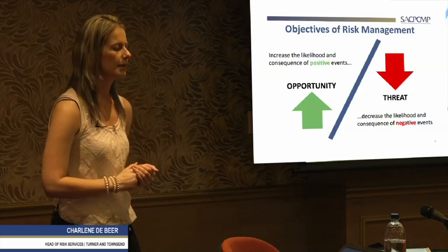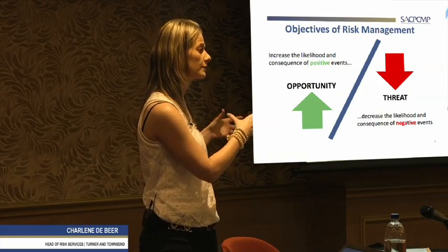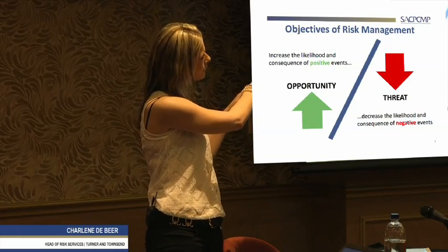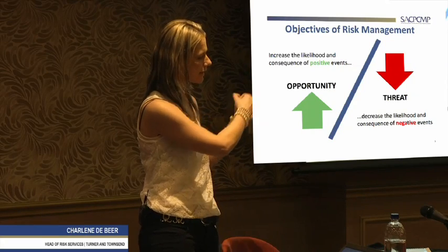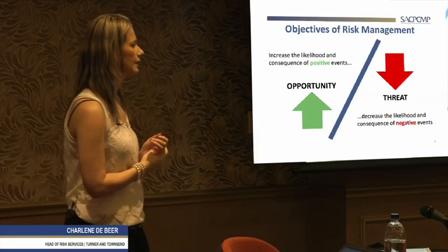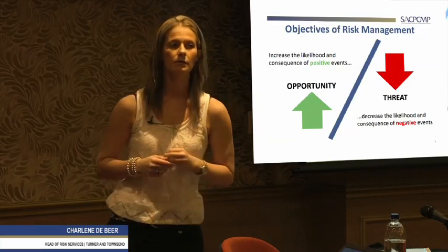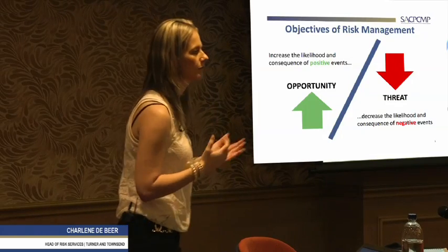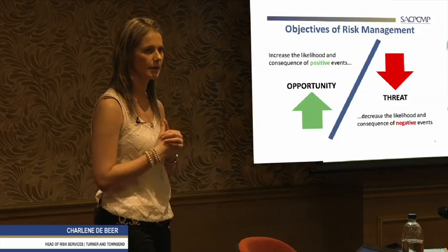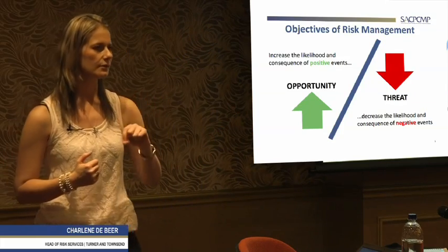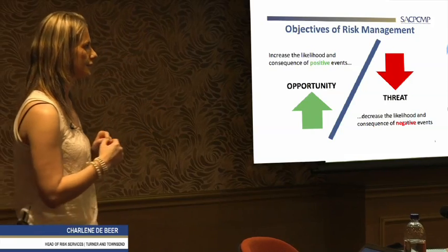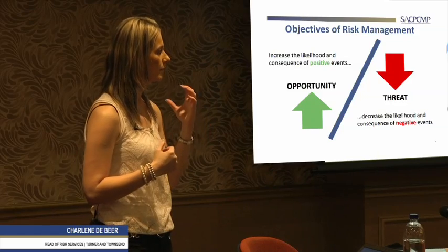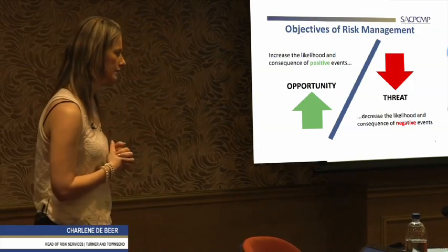So what we would do is we will say, well, what's the likelihood of us being able to procure this material this year and not next year, in order to tap into that opportunity of the cost saving of a few million. Then we'll say, well, it's very likely we can get the orders out, place the orders, we can have it on site before the end of the year, have the invoices paid, and the consequence of that is that we've had a 30 or 40 million rand saving on bulk material. So we tend to miss opportunities in projects, and there's actually quite a few opportunities that we can explore and that we can actually tap into and make sure that we do get that cost saving.